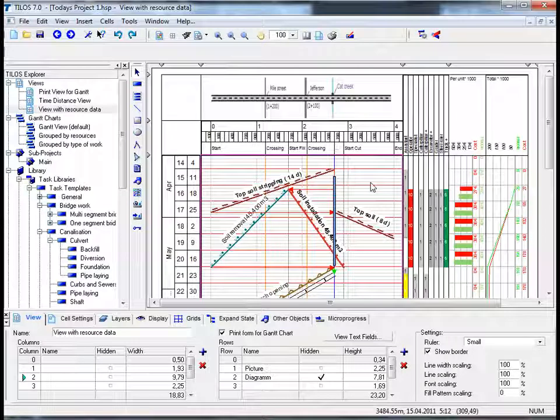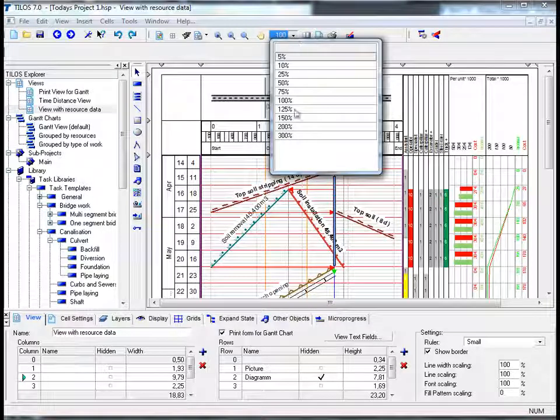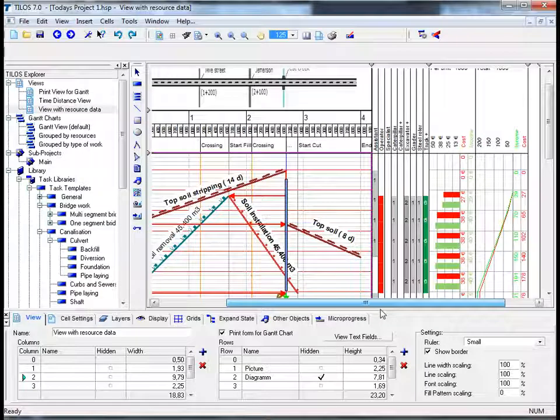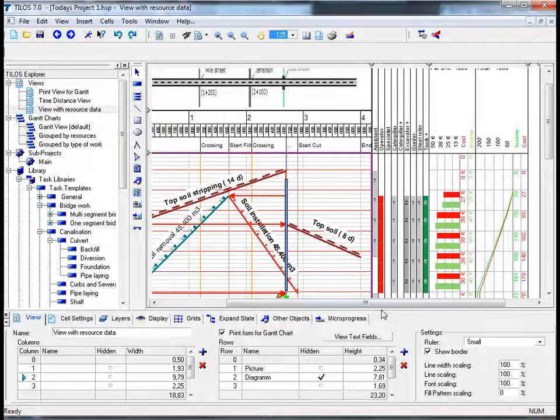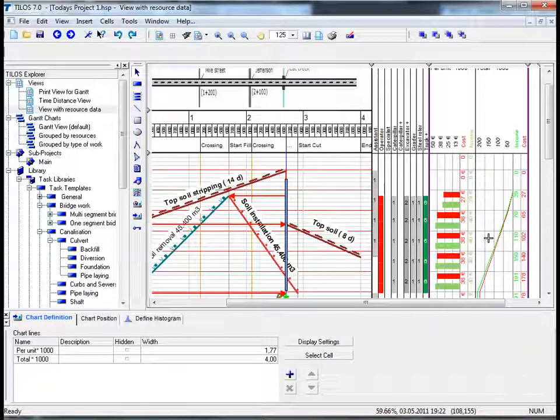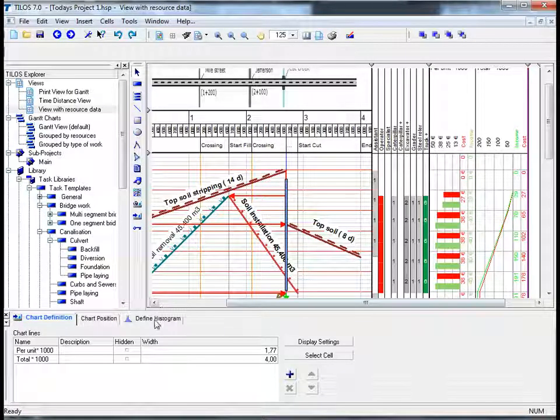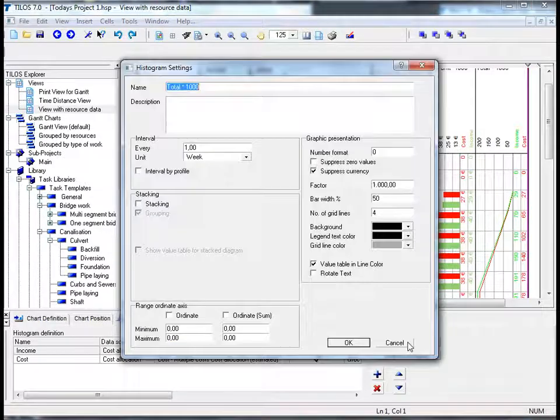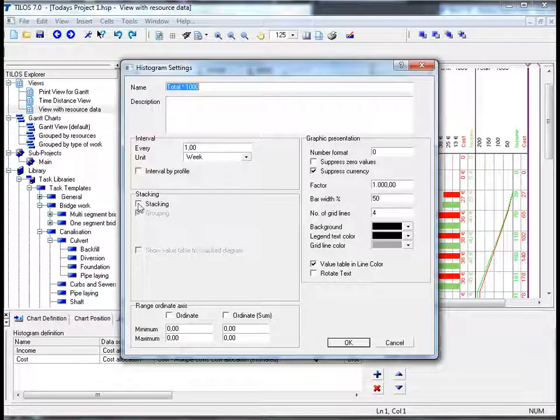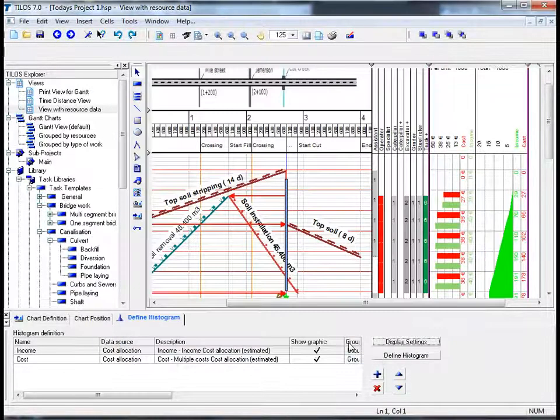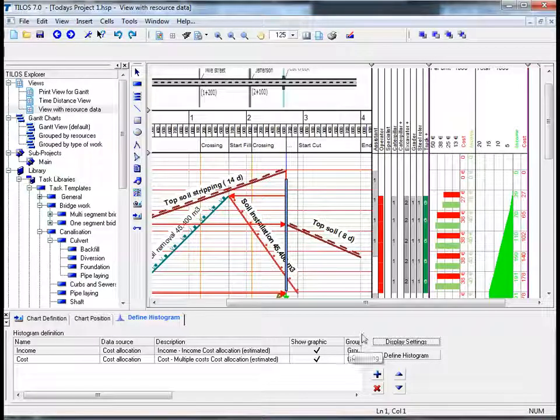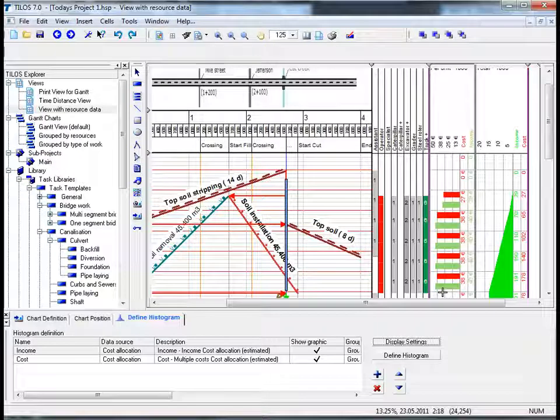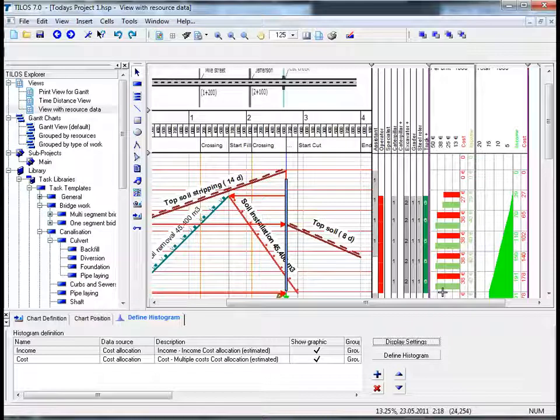Before I proceed to show you the difference between cost and income, I am just going to increase the view of the page slightly. So if I click on the main toolbar and select 125%, I think generally for this purpose this definitely is more visibly and graphically appealing. By clicking the diagram or the histogram as we call them in Tylos, in the details toolbar, clicking on the define histogram view tab and then selecting display settings, I can tick the box next to stacking and grouping and confirm OK. I can now see that during the first weeks of our project, we have taken in more money, we have had more income in green than we have incurred cost displayed in red.